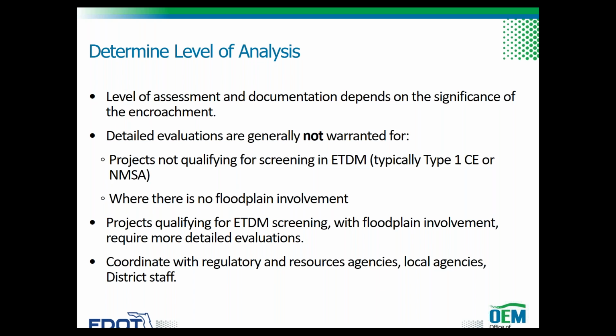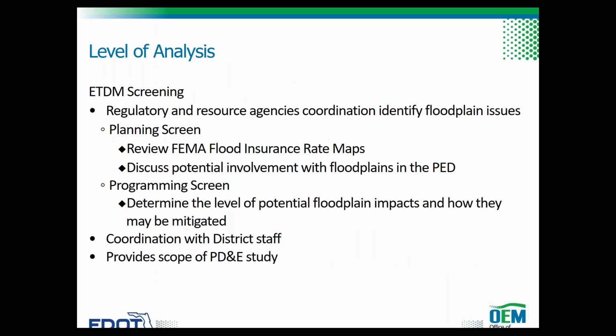Coordination with regulatory and resource agencies, local agencies, and FDOT district staff throughout the project development process is useful in identifying floodplain values, environmental data, and local drainage studies or watershed-specific studies in the project area. The project manager should coordinate with the regulatory and resource agencies and the local agencies throughout the project development process. This coordination begins during the planning and programming screens of the ETDM process.